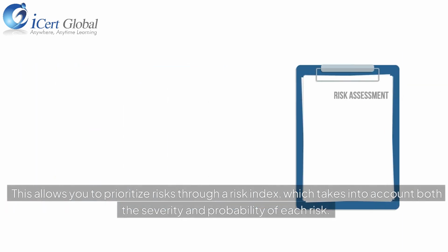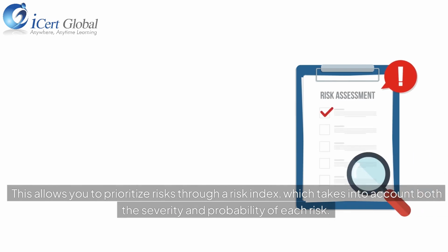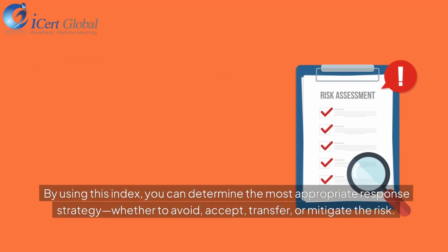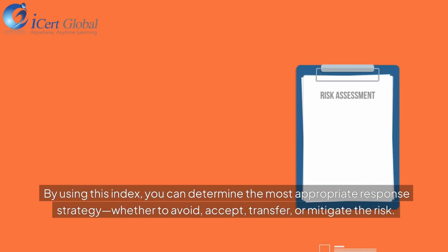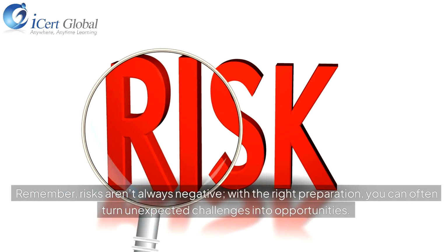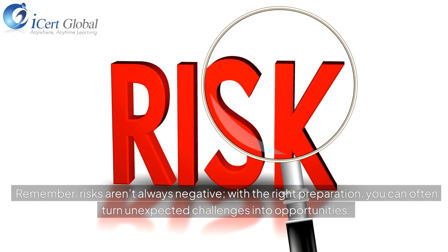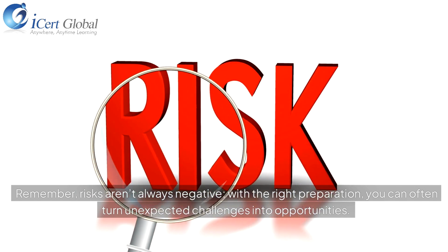This allows you to prioritize risks through a risk index, which takes into account both the severity and probability of each risk. By using this index, you can determine the most appropriate response strategy, whether to avoid, accept, transfer, or mitigate the risk. Remember, risks aren't always negative. With the right preparation, you can often turn unexpected challenges into opportunities.